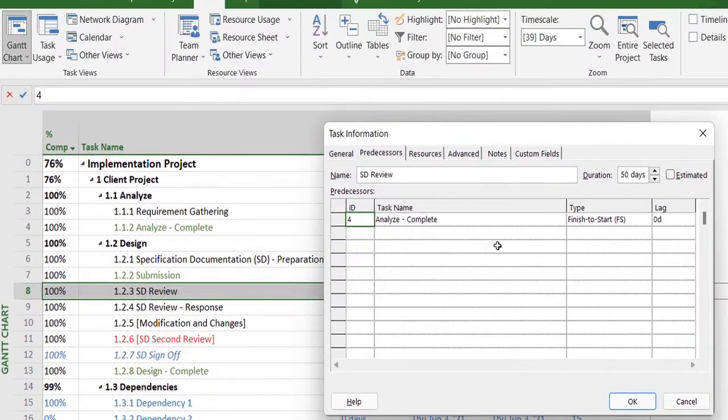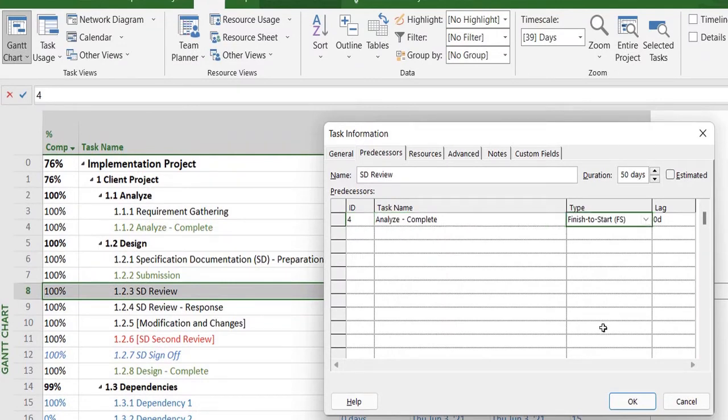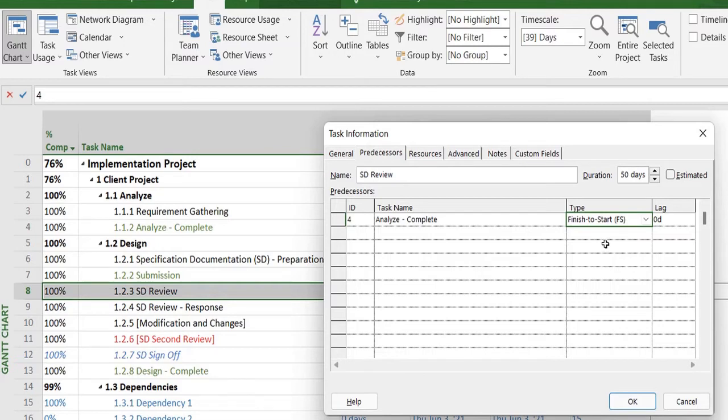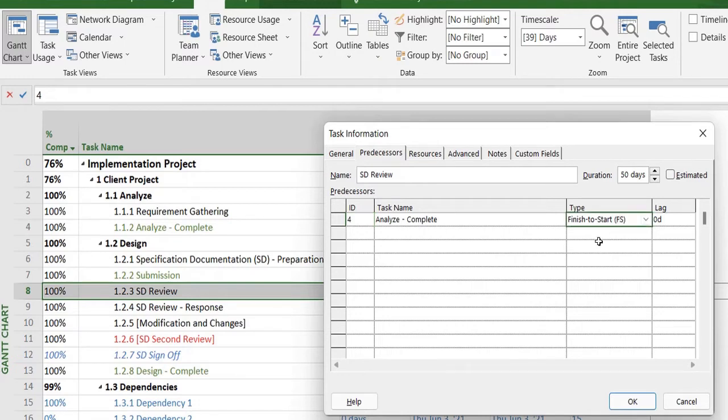The name is Analyze Complete, and its default mapping or relationship with that task is finish-to-start, which means that task number 4, the task with ID number 4, will finish, after which this task will start without any lag.